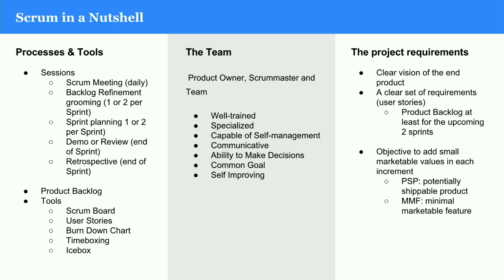The requirements for Scrum: have a clear vision with the ability to adapt during that vision. But once the sprint starts, stay on that goal with no distractions to the team. It helps to have a backlog for at least two sprints so there's a constant lifecycle always moving forward. The objective is to have an MVP — or PSP or MMF — at the end of each sprint, something to show what the team did.